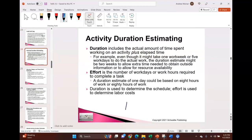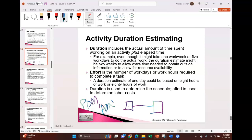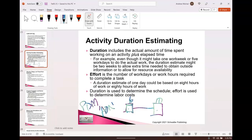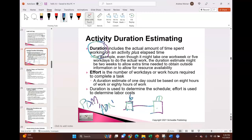Each activity, each node we define in a PDM — precedence diagramming method — using the activity-on-node form, has to have a duration. How long will this activity take? Maybe six days for one, ten days for another. Based on how many people work for us, their skill level and experience, we determine how long it takes. I might complete this in two days with the right staff, but with a young, less experienced team, it'll take six days. That elapsed time is the duration — the time before you move on to the next node.